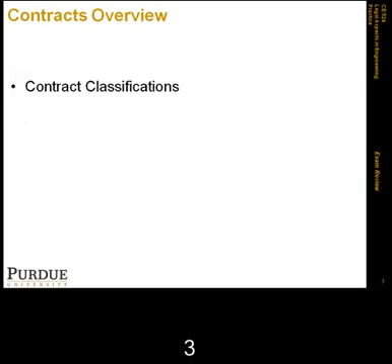components of that contract. We also started talking about an important concept, which is the concept of mutual assent, which we defined as the meeting of the minds that's needed for creating a valid contract. Each party should believe that they have entered into the contract, and the way we express this mutual assent is through something that we call offer and acceptance. The parties usually communicate this offer and acceptance either orally or in writing.